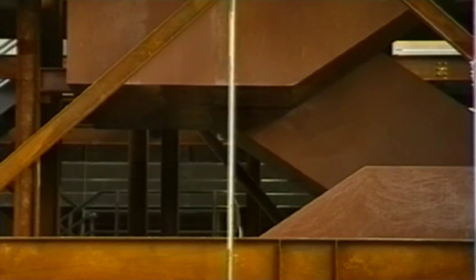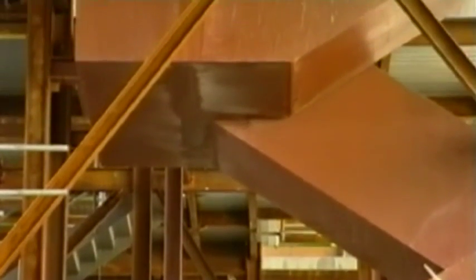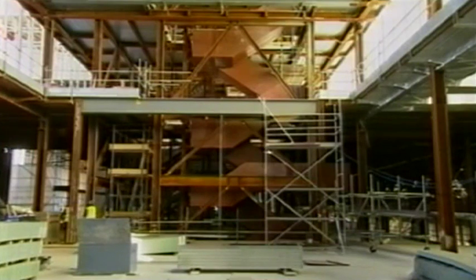It was never the idea that this should be all the way through the same. The stair reacts to different conditions on the different floors, looking out onto the concourses and so on. And therefore, we liked it that in one instance you would be really compressed there. And I think certain people think that's just a bit over the top, and that they would like this bit to be more generous. In fact, being more generous is required by law. The stair is currently contravening building regulations, and the relocation of one level could cost £60,000.